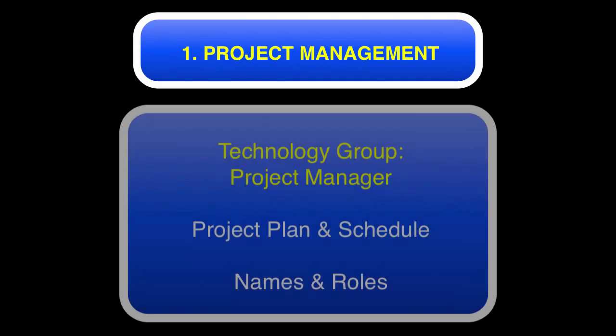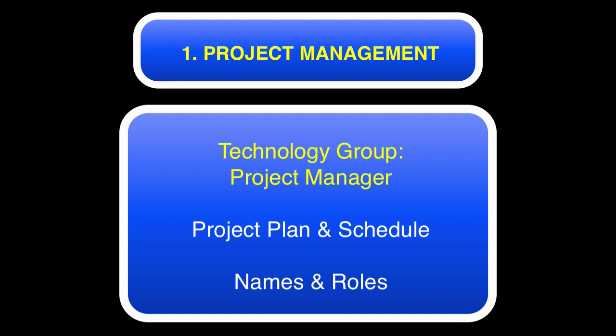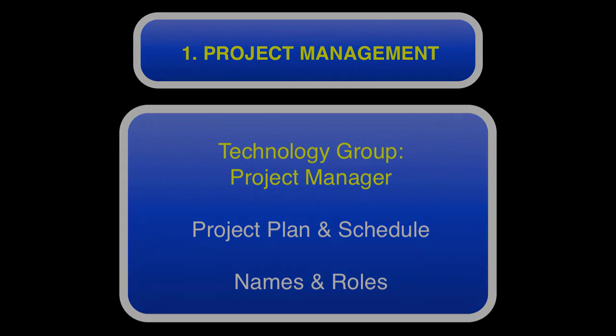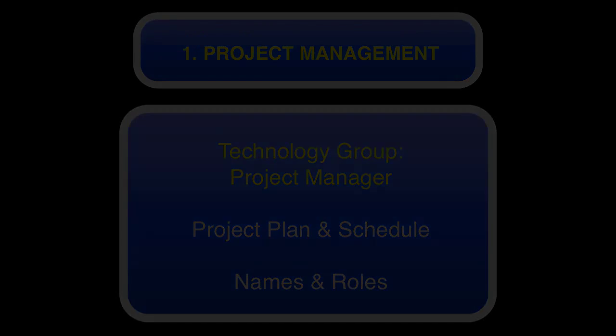In terms of project management, the technology group is going to name a project manager to coordinate all aspects of the project, including the development of a detailed project plan and schedule. They're also going to do what I think of as 'names and roles' at the start of the project — creating a list of stakeholders, a single point of contact for every vendor group and system area: database group, app group, security group, etc. And each stakeholder will have a clearly defined role.